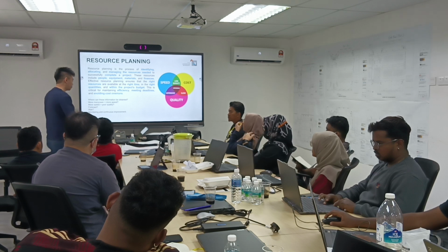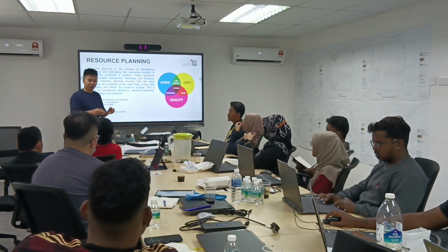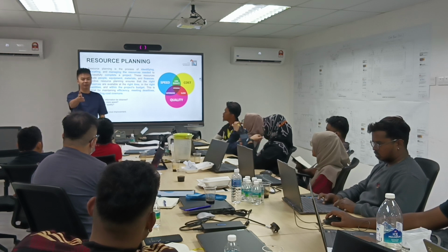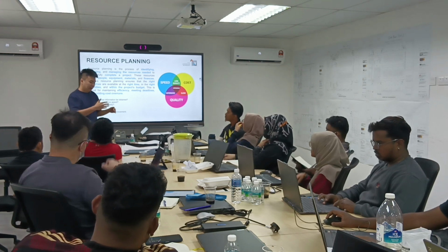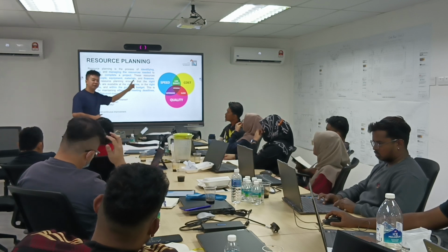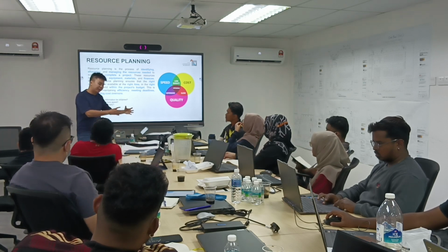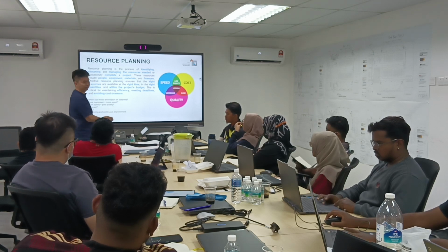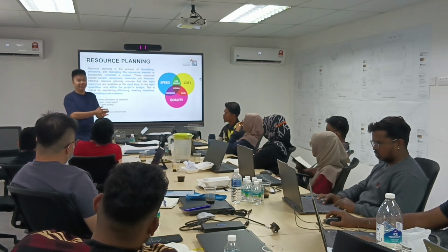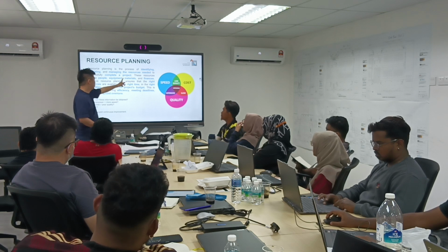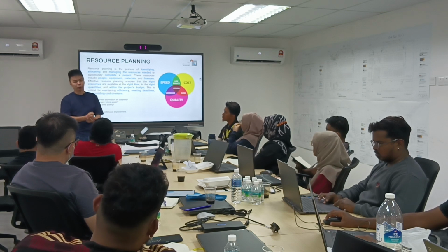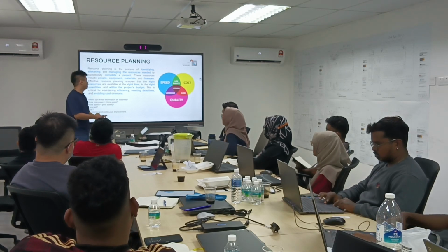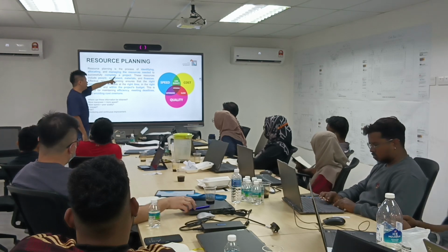Every day when you run the project site, you see your contractor, for example, installing the fuel pipe or the ducting or whatever. You need to identify the quantity of labor on site for that activity. Is it achieving your target date? If the answer is no, then you need to highlight the issue and request the vendors to pump in more resources. So that is managing the resources.